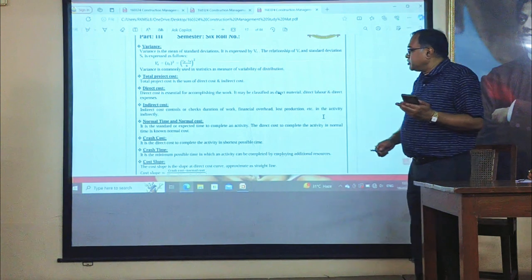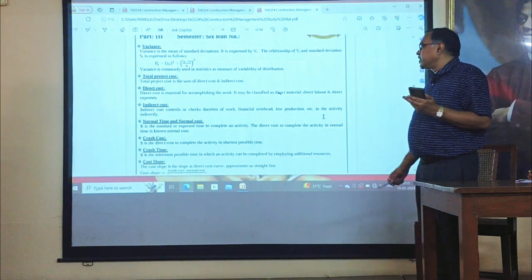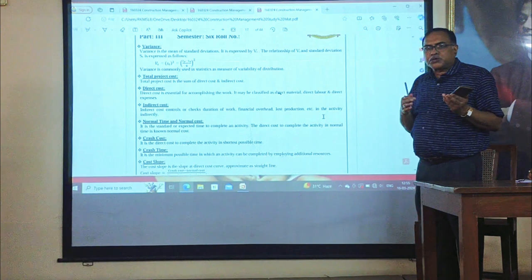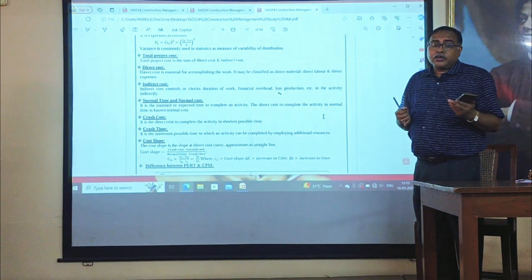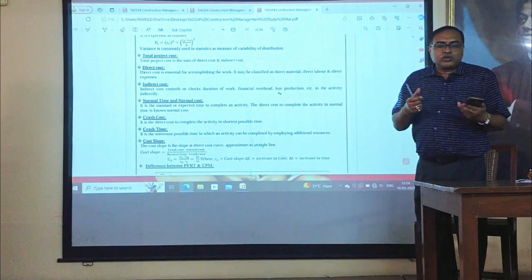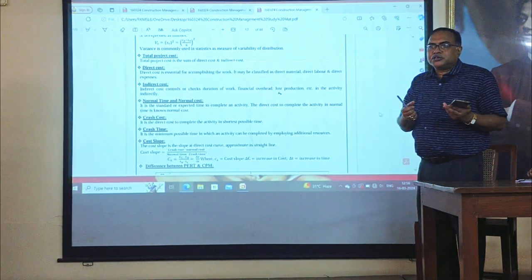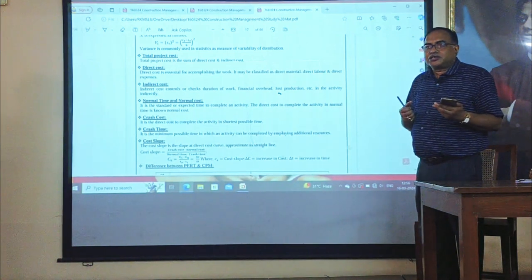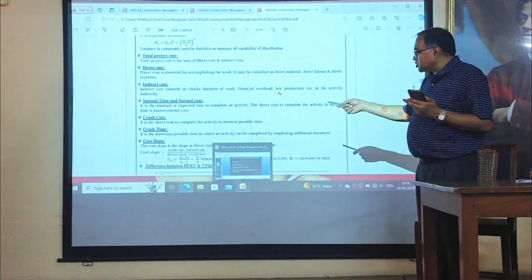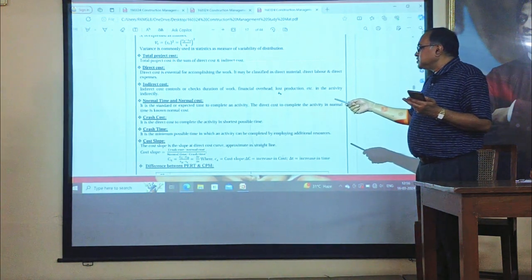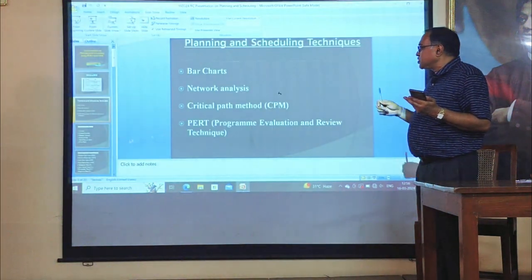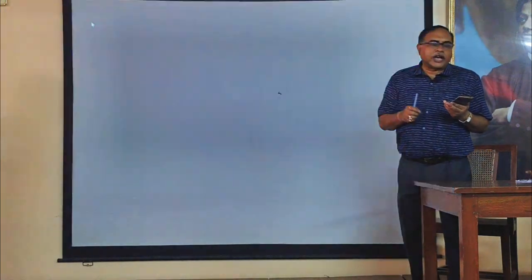And next is our normal time and normal cost. It is the standard or expected time to complete an activity, which is called our normal time. And the cost corresponding to normal time is called normal cost. When we use some other, extra resources, we can crash this duration. We can reduce the duration of the project, for which we have to use some other resources. This will be called crash time. And next is our cost slope. Cost slope is (CT minus CN) divided by (TN minus TC). That is, del C by del T is equal to cost slope. This is the difference between our cost and time. Next.